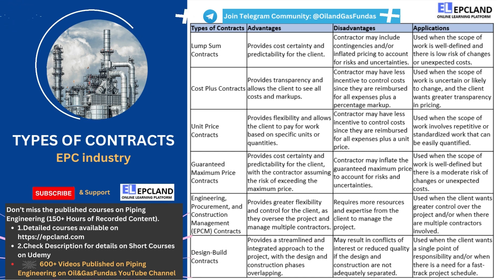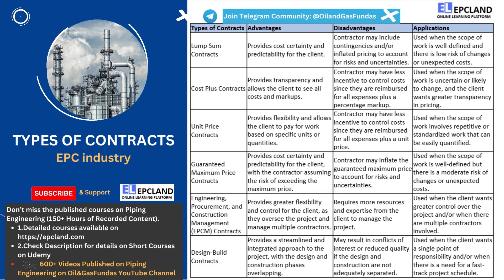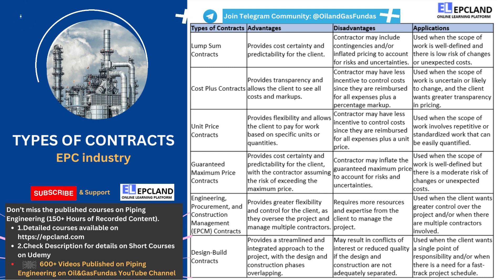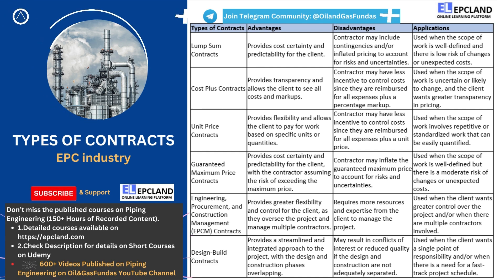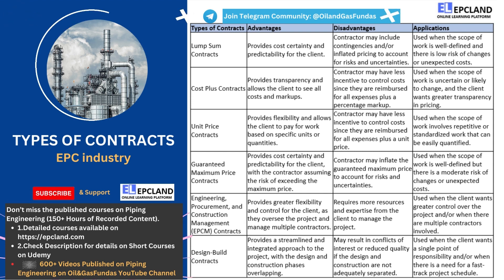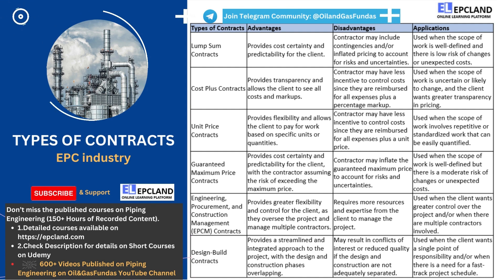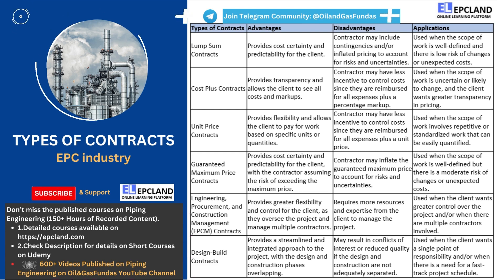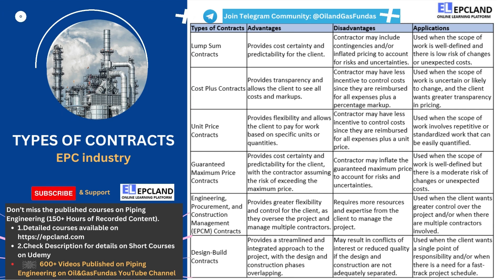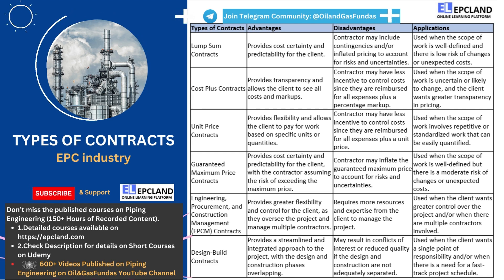However, there are also some potential disadvantages to lump sum contracts. Because the contractor assumes the risk of unexpected costs or changes to the scope of work, they may include contingencies and or inflated pricing in the lump sum to account for risks and uncertainties. This can result in higher overall costs for the client. Overall, lump sum contracts are best suited for projects with a well-defined scope of work and a low risk of changes or unexpected costs. They can provide cost certainty and predictability for the client, but may result in higher overall costs if the contractor includes contingencies and or inflated pricing to account for risks and uncertainties.